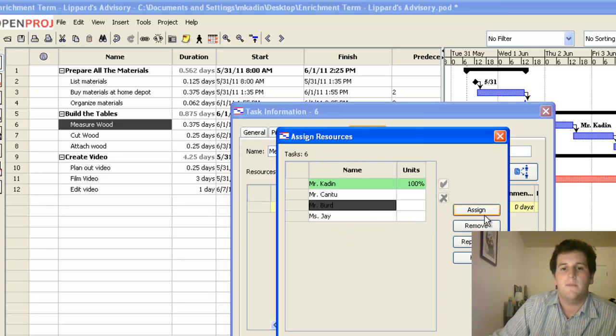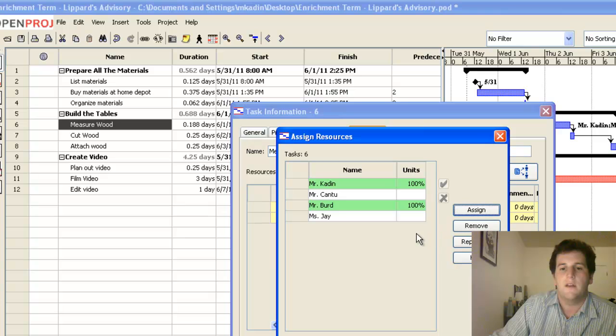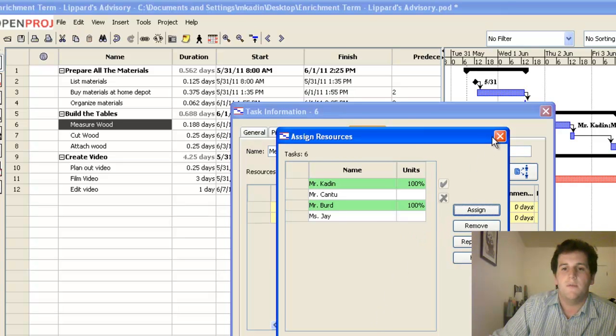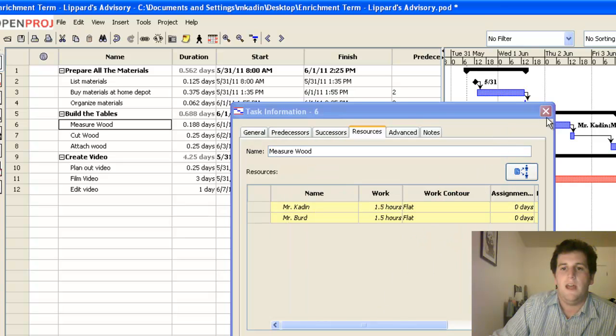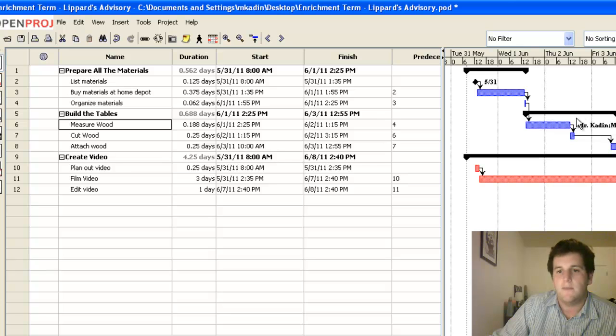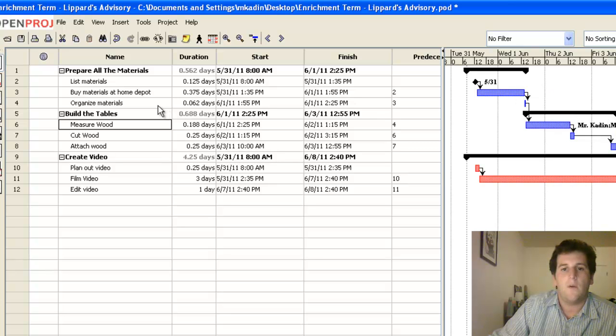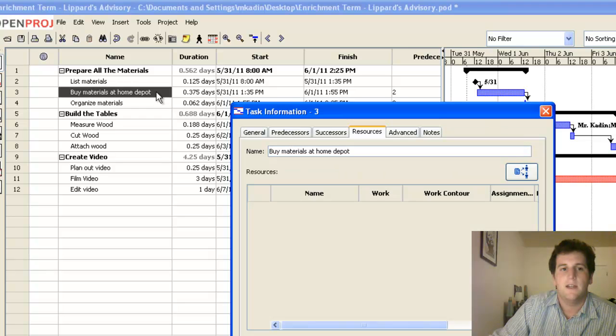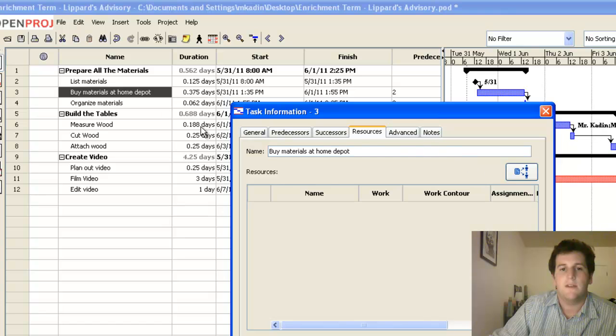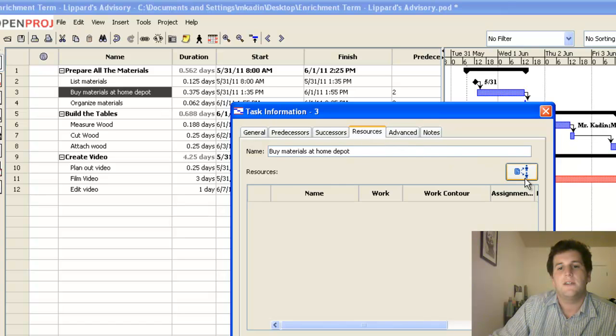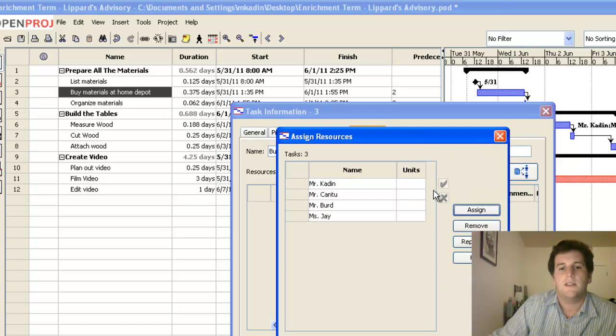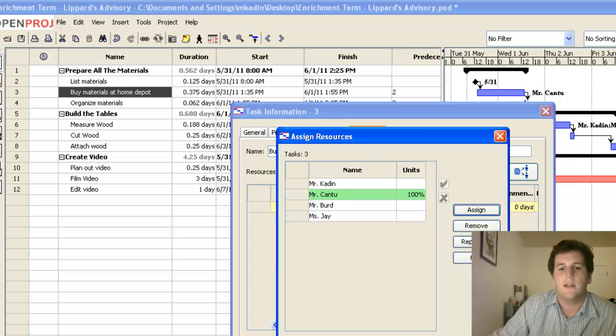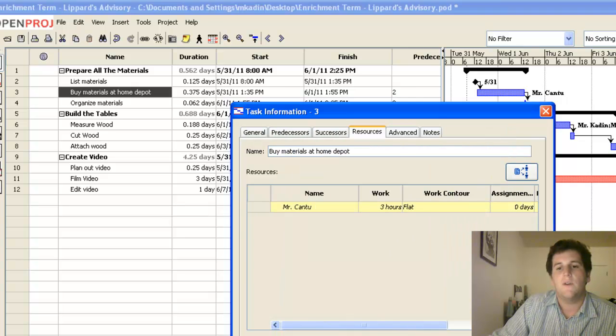And then I'm also going to assign Mr. Bird. Both of those two people are going to be working on that. And you can see on the Gantt chart, their names come up alongside that task. What about organizing the materials? Well, Mr. Caden is really, really very much not organized. So we're going to put somebody else on that instead. So we double click on that. We click on resources. And we can assign Mr. Cantu to that because he's a really organized guy.